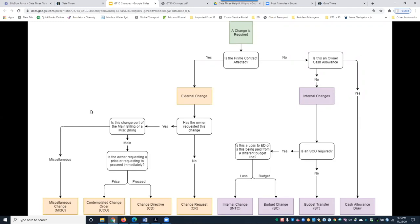For today's demonstration, we're going to do a contemplated change order — something the owner is requesting a price on. It was requested by the owner, therefore it is an external change, which also affects the prime billing.